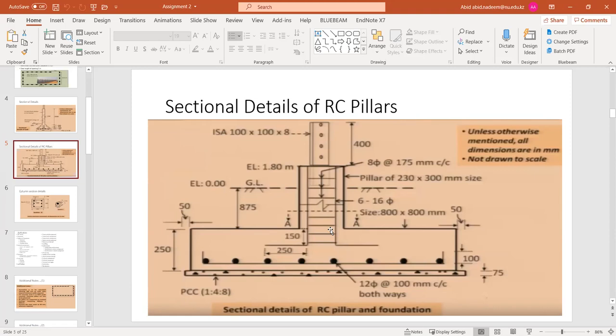So, many of the subsidiary or supporting works have to be scheduled, okay? So when you consider it practically speaking, so many of the supporting works have to be scheduled as well. So in this case, again, we are assuming that these cages for the column reinforcement and then the network of these steel bars for the footings are available.